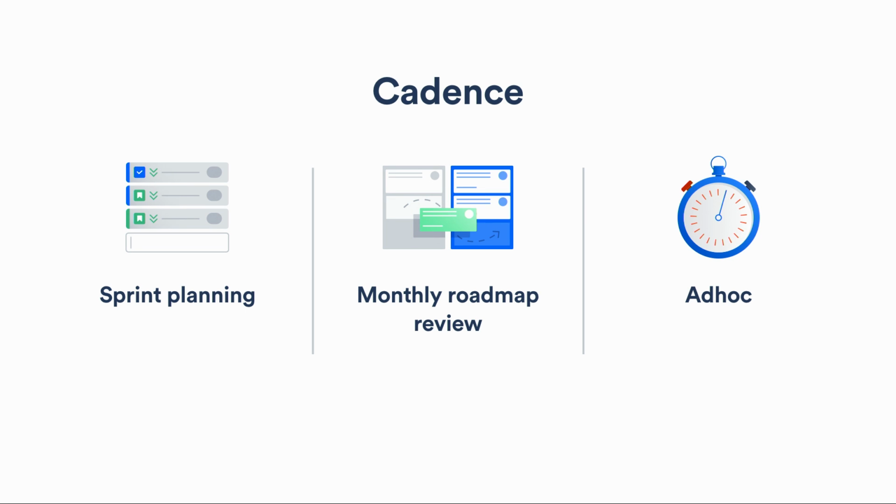And lastly, building up a muscle around performing ad hoc sense checks. So whenever we get new information that is important, we realize will have an impact, like we get new headcount, we lose someone on the team, someone decides to go on leave and locks that leave in, we immediately go back to our roadmap and start to think about, okay, what impact is this going to have and what do we need to shuffle around and who do we need to tell about these changes so that we have set expectations to be as realistic as possible.